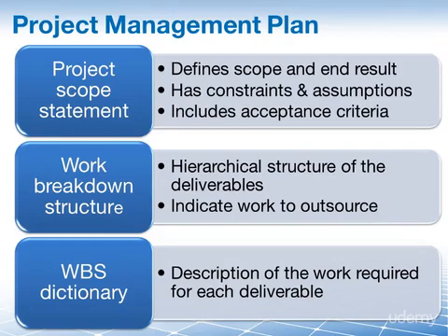It might be a great idea to read that description at this point and learn more about what exactly it is that we need to purchase. Remember, our main focus in the plan procurement management process is that we want to figure out what it is that we will purchase. And the work breakdown structure and its associated dictionary are deliverables oriented and help you define the what you will have to purchase.